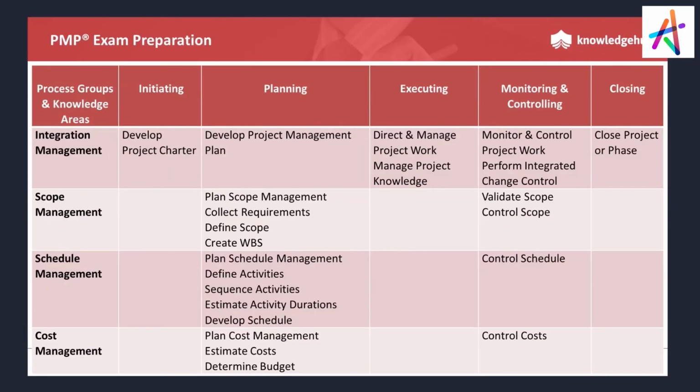Now, this slide talks about project management process groups and how the processes are taken up. Here, as you can see, we have given out how we have the processes structured. In initiating, that's where the process starts. Then we plan and get it approved from the relevant stakeholder, and then we execute. While executing, we monitor and control, and maybe because of the change, my plan baseline document might get updated. It keeps on going in a circle unless we approach the time when we have to get all the deliverables validated, which might happen throughout the life cycle of the project as well, and get the sign-off.